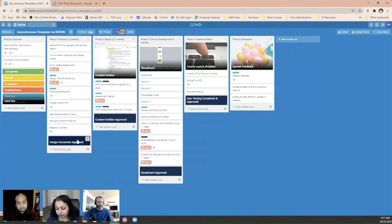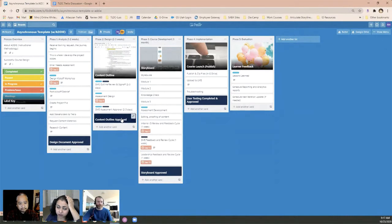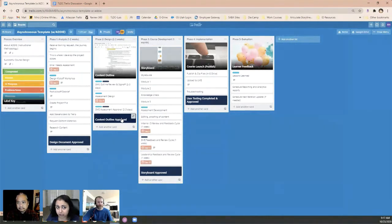She makes sure to have approved checkpoints so she can move forward in the project. She learned through trial and error that without those checkpoints she gets bounced back into scope creep or pushed into another design phase that she doesn't want to revisit once it's already been approved and signed off.